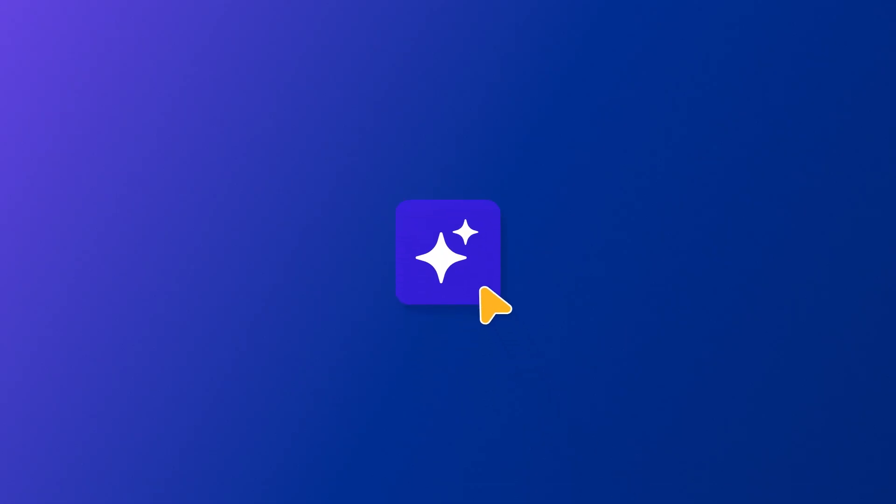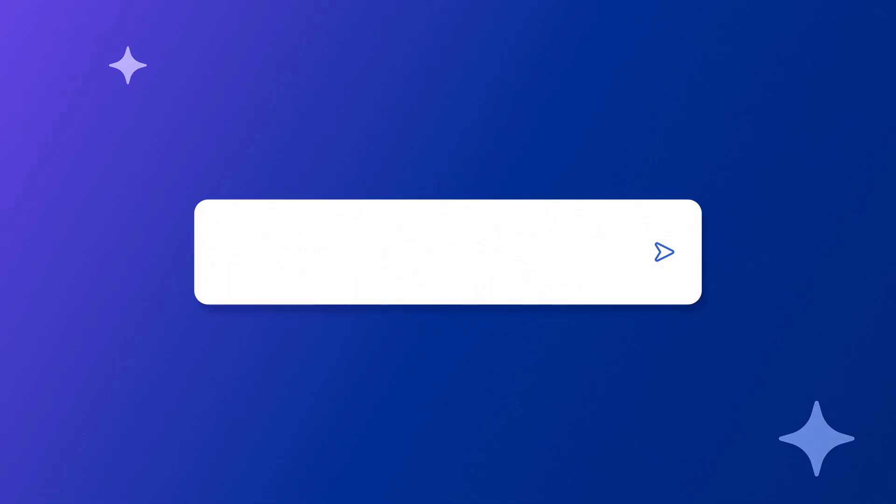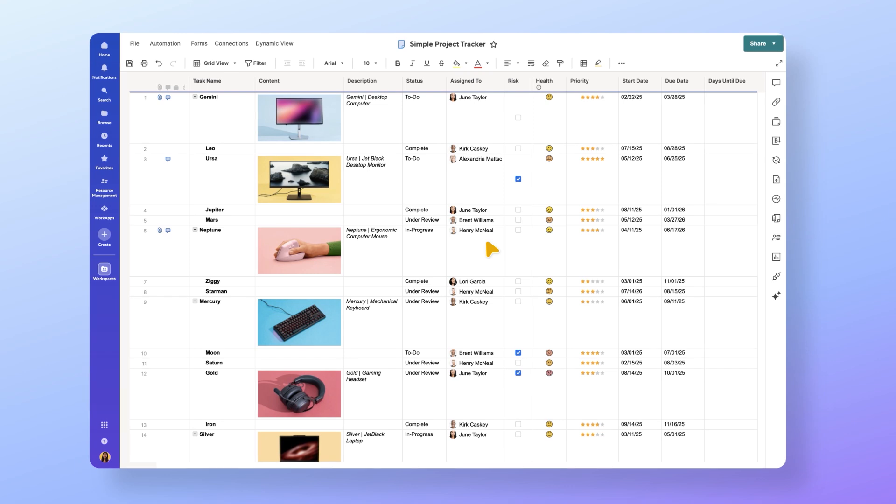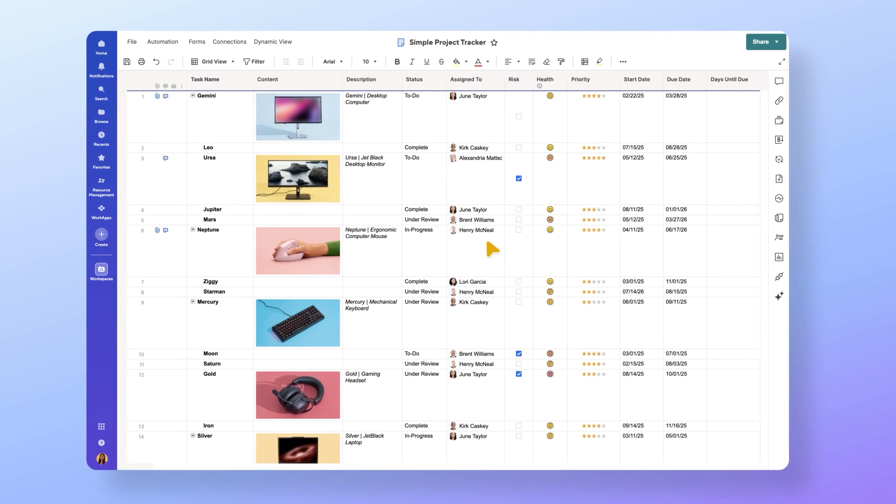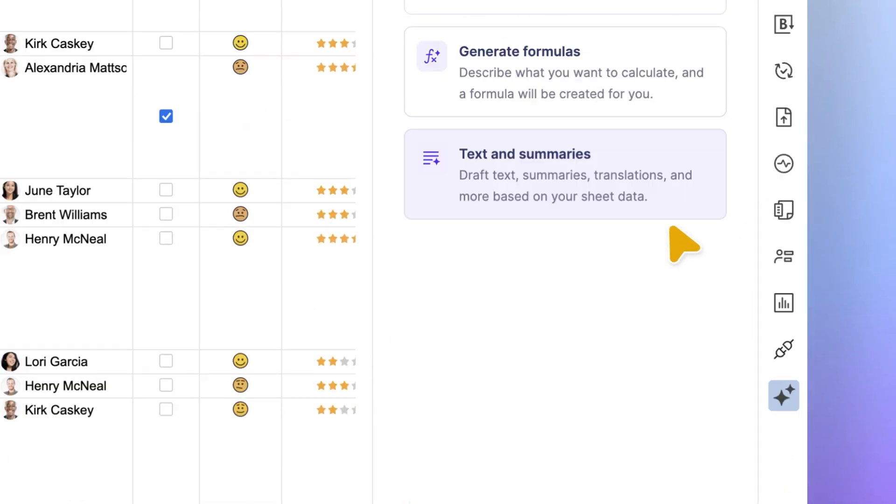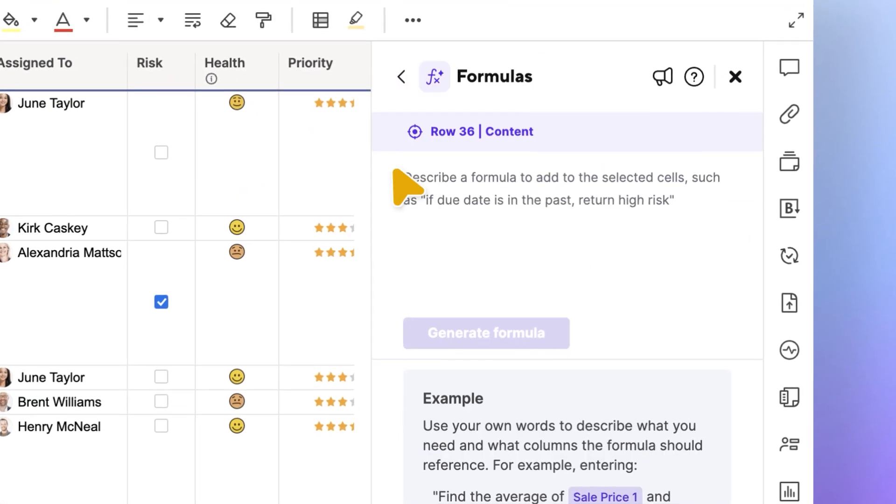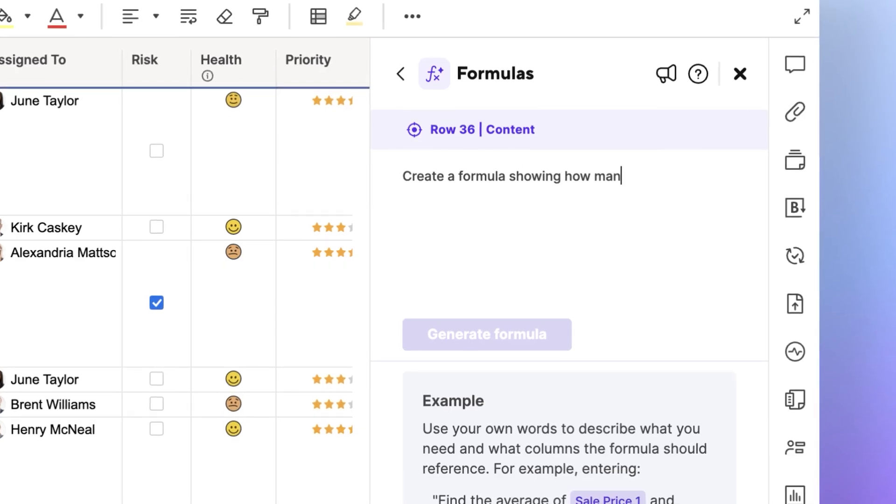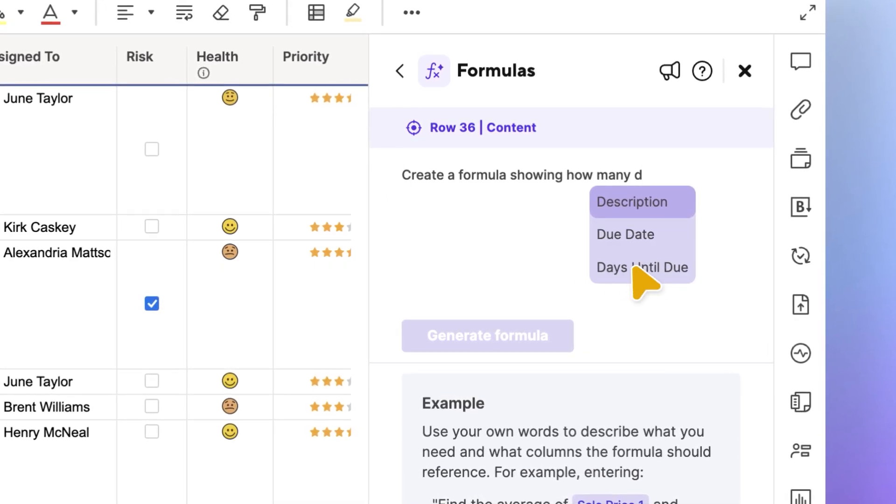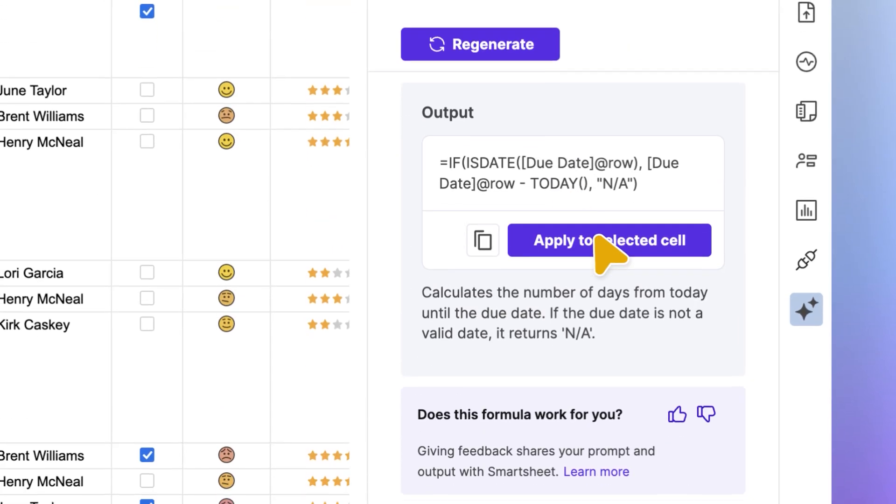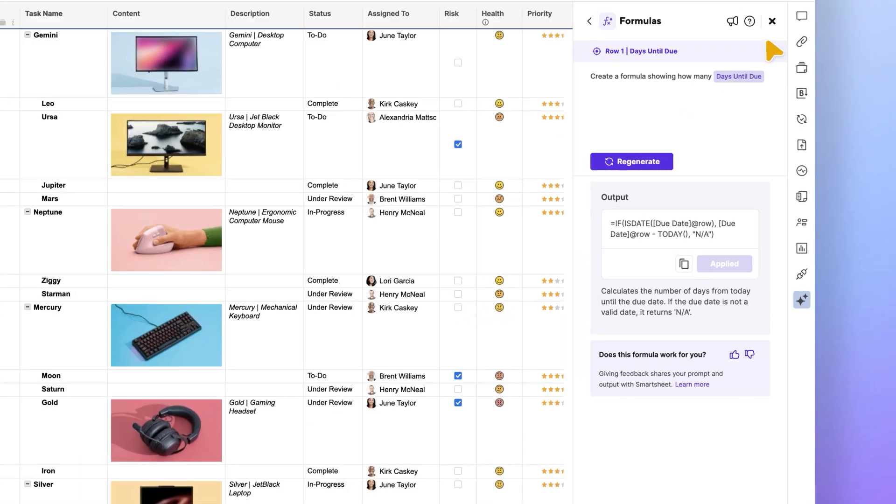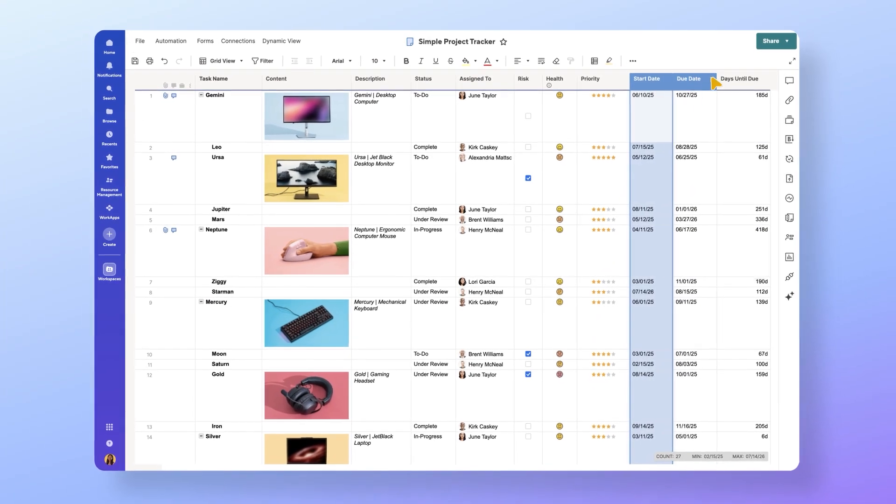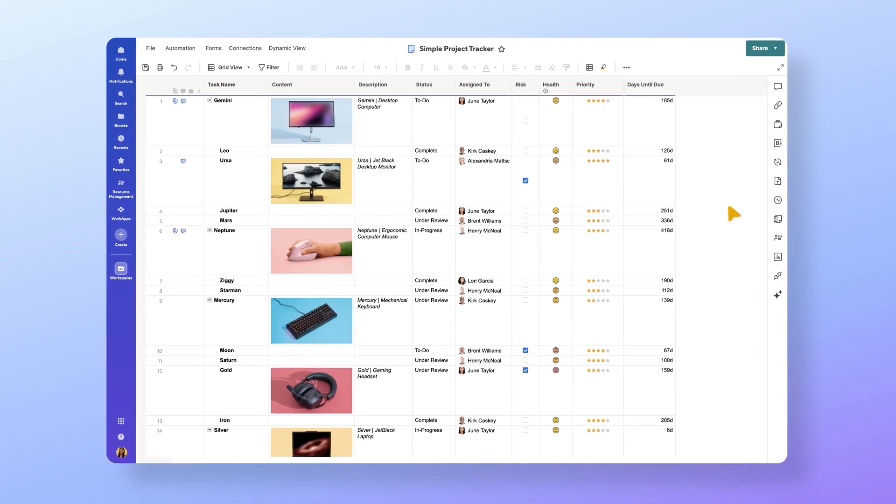Let's dive deeper into the AI-powered tools. Just say what you want. In Smartsheet, AI creates dashboard widgets, formulas, and summaries. Let's try a simple example. Back in our project tracker, we can use AI to consolidate the data in our sheet. Let's use it to generate a formula to show us the amount of days left until each task is due. Now we can hide our start and end date columns to make things cleaner. Ah, much better.